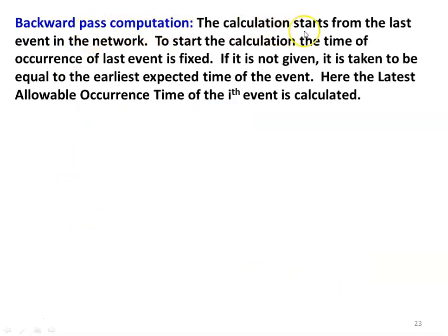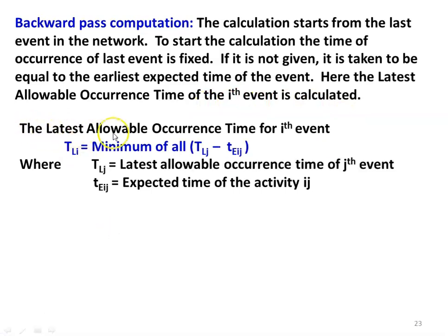In the backward pass computation, calculation starts from the last event in the network. In the forward pass computation, we start from the initial event; in the backward pass computation, we start from the last event. The time of occurrence of the last event is fixed — if given in the problem, we take that value; if not given, it is taken to be equal to the earliest expected time of the event. The latest allowable occurrence time of the ith event: TL_i equals minimum of all TL_j minus te_ij, where TL_j is the latest allowable occurrence time of the jth event.